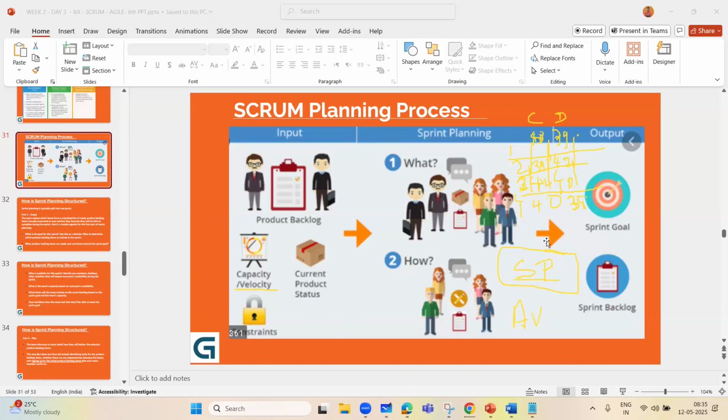towards sprint number 6, you can have average velocity identified. Yes or no? In sprint 5 or 6, you can have the sprint velocity, the average velocity identified. Yes. And how much is this going to be generally? How much you can commit and deliver? Around 40. When you see this is 39, this is 42, this is 40, this is 38 and 39, again 40, then you will identify the average velocity is going to be 40. With me so far? Yes.